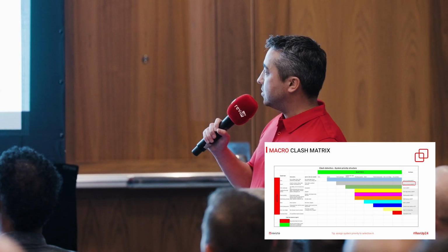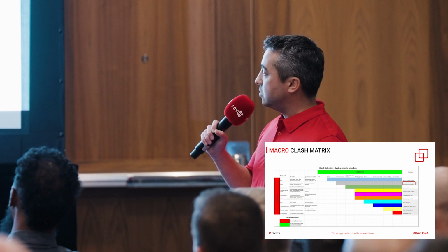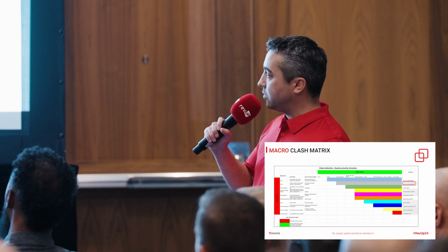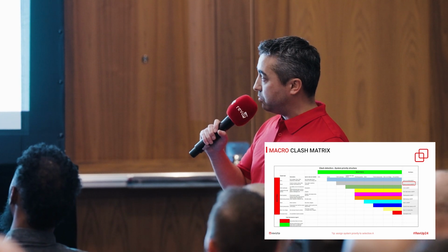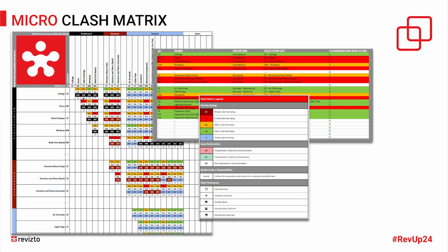Another thing to note is when I think about setting up tests, I like to think about it as simply as possible, and I like selection A to have the priority. So I know that everything that's clashing with the selection in B automatically gets the assigned clash. So I'll let Jason talk about this. This would be a micro strategy as far as clash using his clash matrix.